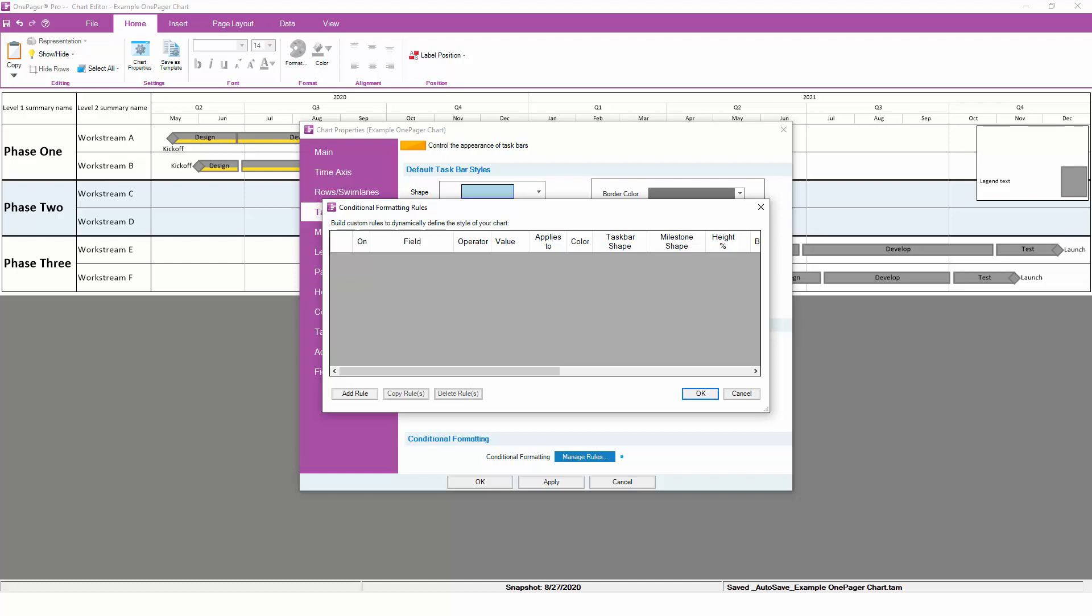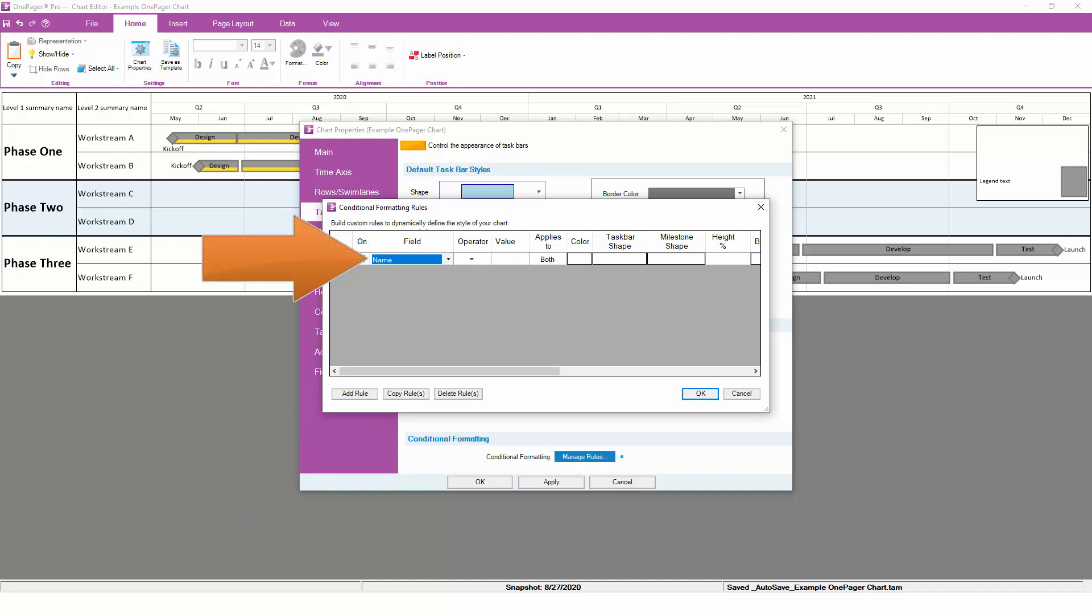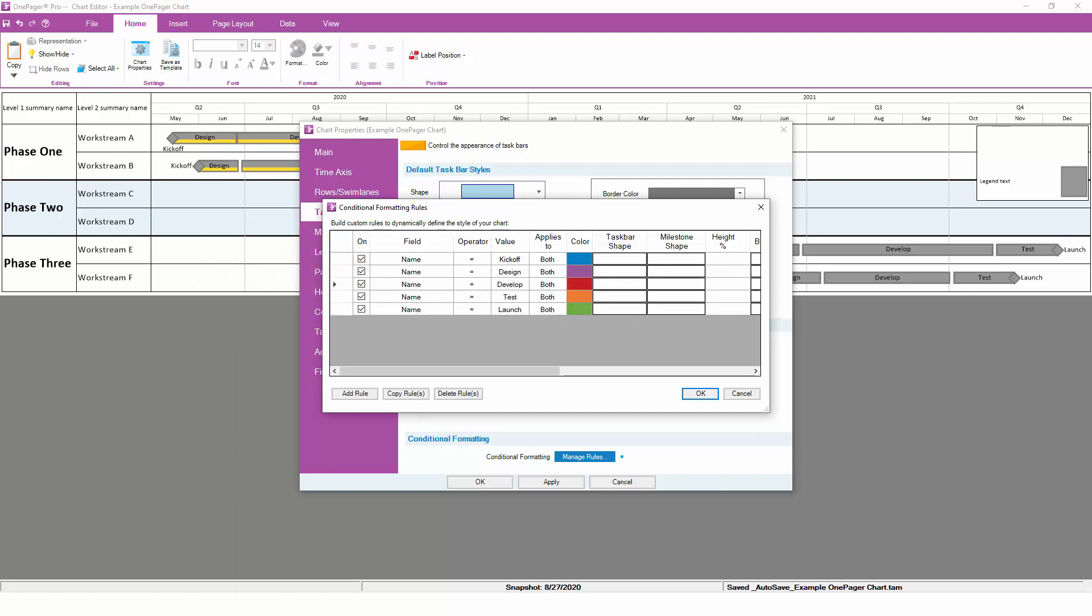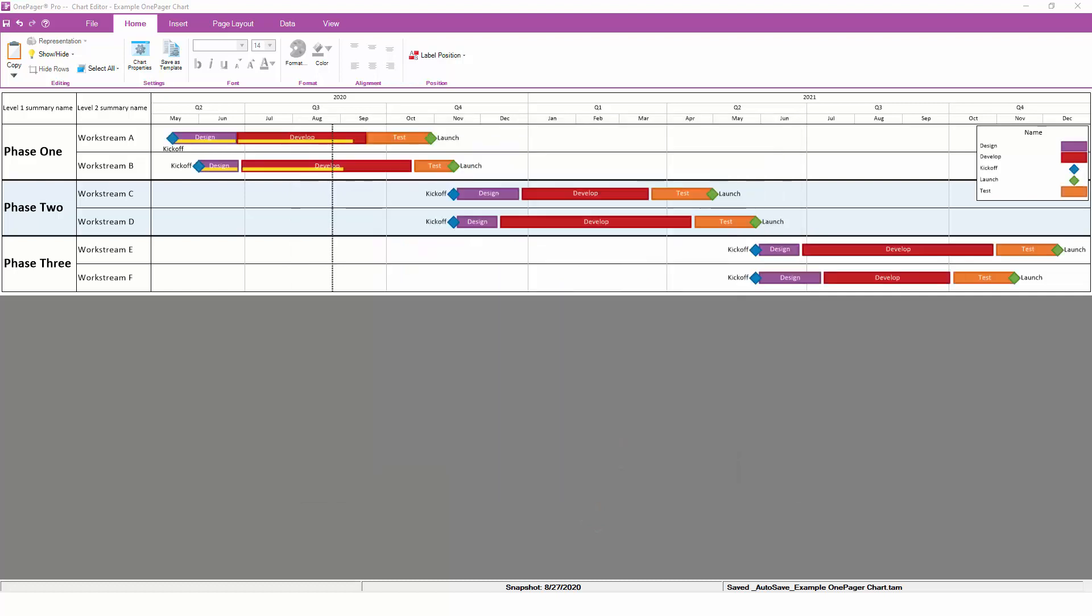Each of our workstreams represents a sequence of five repeating tasks and milestones, so we can set up five rules to assign a different format to each family of tasks. For example, this first rule states that anything named kickoff should be colored blue. We can copy that rule four more times to capture the other conditions. Now we have a unique color for each type of task.